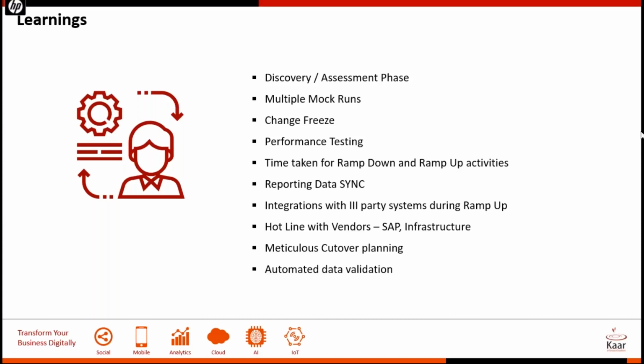Having said that, what we propose is always a lift and shift model, where we take your ECC assets, put you on S4HANA, and then leave a 3-month stabilization period, and then we start to really use the new functionality of HANA. Possibly a couple of really required Fiori screens would be activated in this phase, but post that we will identify what more has to be done and do that in phases. So that is how it's done.